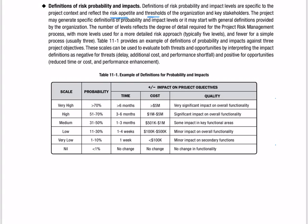So you see, a very high risk is considered if the probability of occurrence is more than 70% for a timeframe of six months project and a dollar value of $5 million. This is a very significant impact and overall functionality might get impacted, so this risk has a very, very high priority.